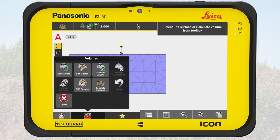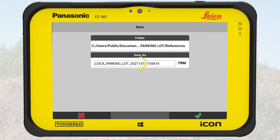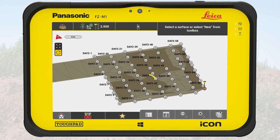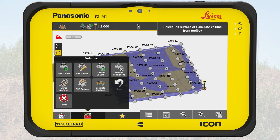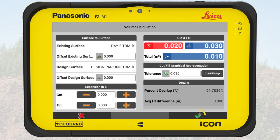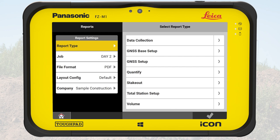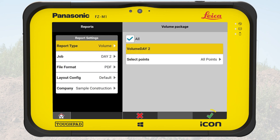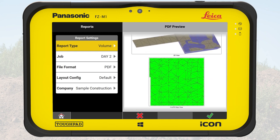At the end of the other day, the dozer also levelled out the rest of the parking lot. Like the day before, we create a dense grid by measuring points and we create another surface. We finish the surface creation and give a name. We calculate the volume between the measured surface and the design file, the same way we did on day one. We generate reports of the two new surfaces, which contain the result of the volume calculation with screenshots in 2D, 3D and of the cut fill map.